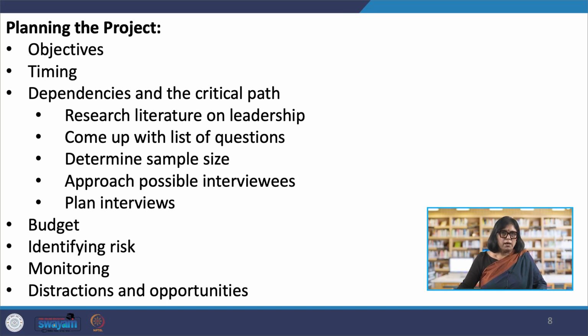You need to take account not only of other tasks in the actual research, but also of responsibilities outside the research, such as other coursework, lectures, family, job, administration, teaching. It is therefore useful to decide how much time you have available on a weekly basis when comparing task duration against lapse time. Your weekly lapse time becomes time allocated to research.